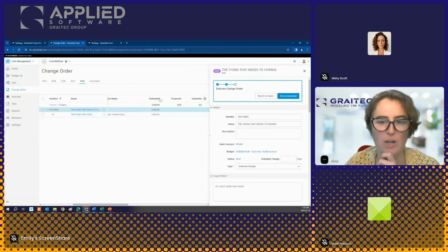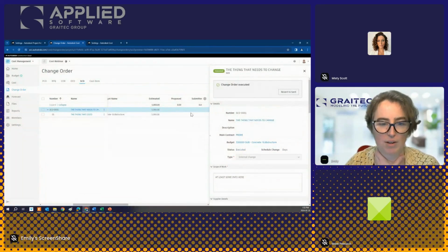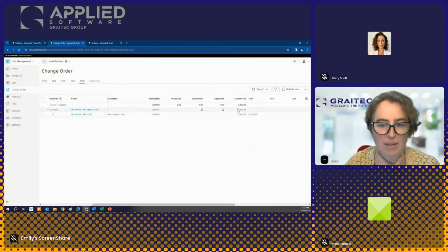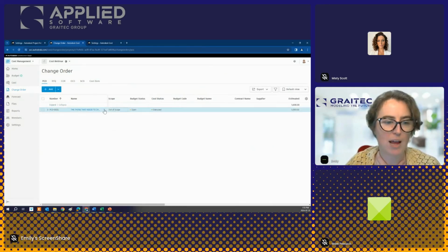So I've sent it out to my supplier. They're going to review it. They're going to sign it. They're going to call me and they're going to say nope. And then when they say yes, we are going to execute it. Now that that's been executed, I can actually go back to my PCO and I'm going to execute my budget change.